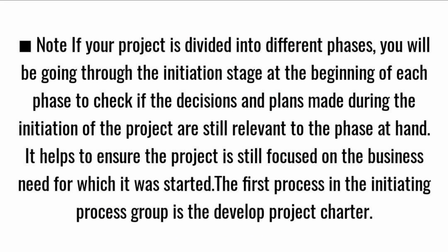Note if your project is divided into different phases, you will be going through the initiation stage at the beginning of each phase to check if the decisions and plans made during the initiation of the project are still relevant to the phase at hand. It helps to ensure the project is still focused on the business need for which it was started.